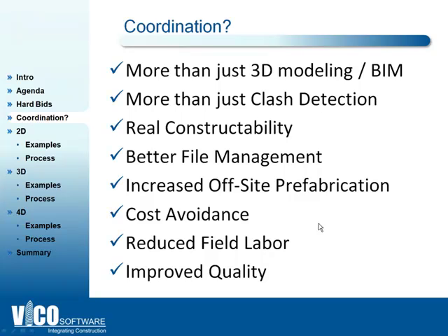As Holly has many a time suggested, with VDC many people talk about building the building twice, having a practice run. But all too often we hear this associated just with clash detection. Pre-construction doesn't end with clash detection and the coordination session that we have in 3D. True coordination extends the BIM and provides this value of work onto the site. So we can see more prefabrication, less rework on site, and better sequencing of operations to reduce field labour, interruptions, and downtime, and overall improve the quality.